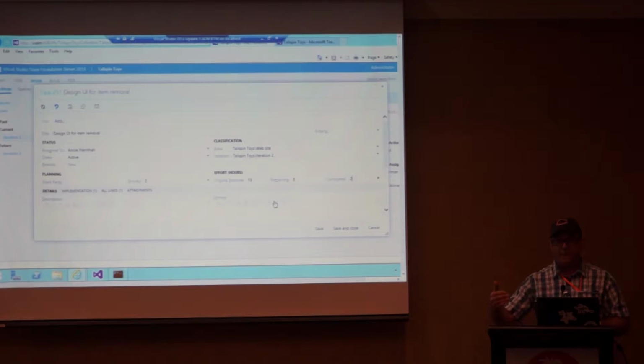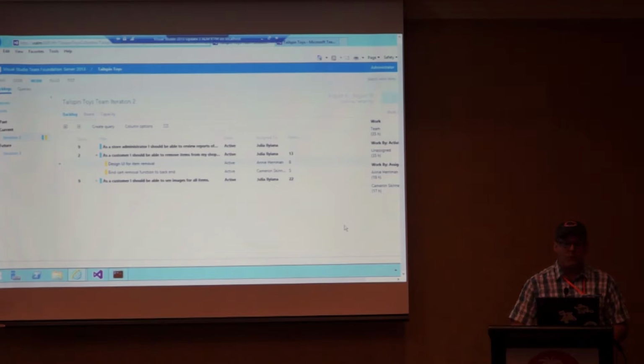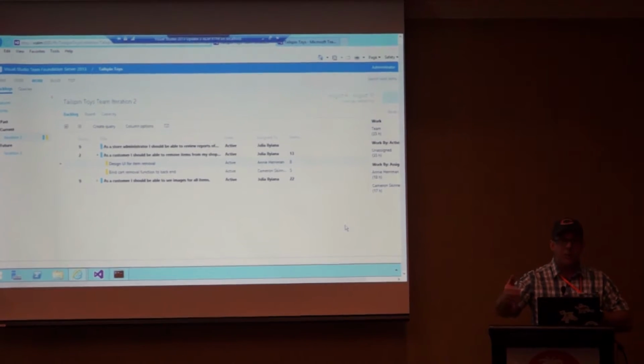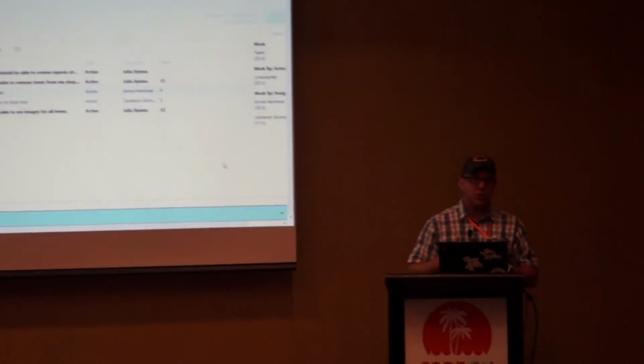So developers may find it very much of a nuisance, but if they look at it from the perspective of the manager, even if you do it at the end of the day and keep track of what you worked on that day, or when you close the item out for the day, it's going to benefit the team in the long run. Not only are you going to be able to estimate your hours better, but now your velocity is changing, because maybe your effort of 2 was really an effort of 1 by the time you got done with it. You just thought it was a 2 because you thought it was going to take you 9 hours, when in actuality it took you 4. Especially young teams just getting on their feet, a lot of times that will be the case.